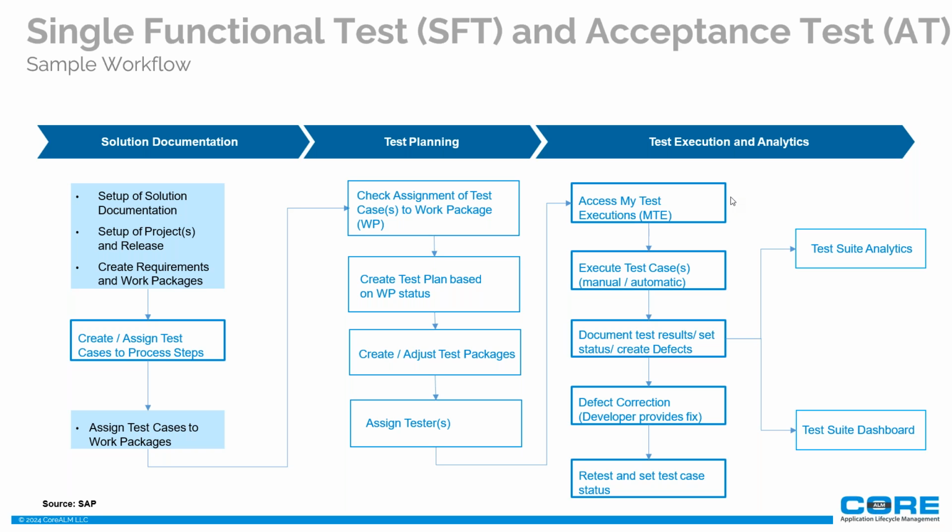And if they have a defect, they will just go ahead and create a defect. And out of the defect, we can create a defect correction, but it can be a sub defect or a defect that needs code to be fixed. So you can have a defect where you just say, oh, it doesn't need any changes, and you confirm it. And if the defect needs changes, they do a defect correction.